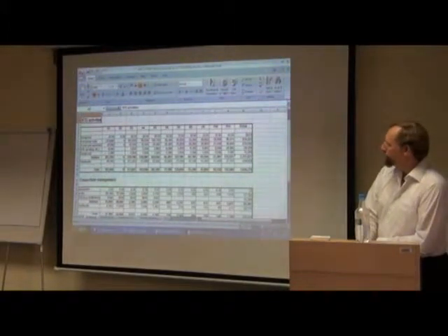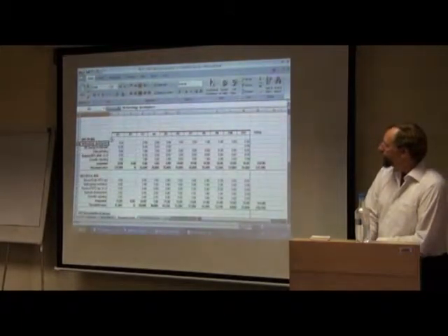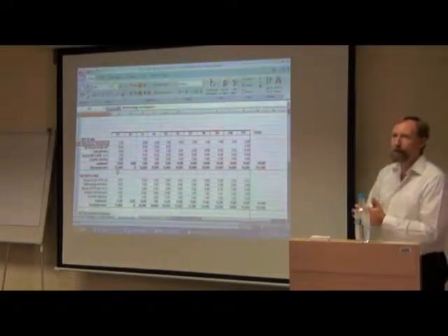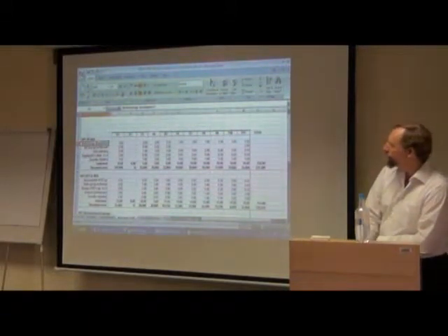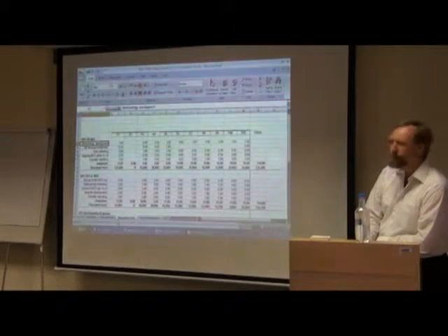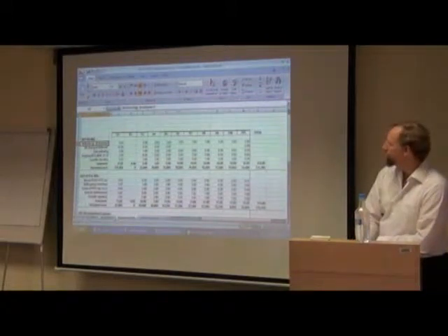Now how do you calculate those person months? I have a separate sheet here. I repeat every partner here, and for every single work package I estimate what the actual work effort is in that work package. We have even split the work package into individual tasks. So you see at this level there are 32 person months for this work package for this partner. And to arrive at the 32, you see task 1, task 2, task 3. You do the same thing for work package 2 and 3, etc. So if you build up this, your totals come in automatically.